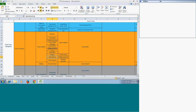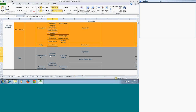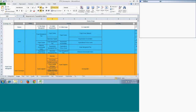Prototyping is a very good tool for collecting requirements. Benchmarking is an industry-standard approach — you benchmark your requirements so that they meet industry standards. A context diagram, similar to a use case diagram, helps you identify different activities that need to happen. Finally, document analysis allows you to analyze multiple requirement documents to find the actual requirements. The outputs of this process are the requirements documentation — containing everything captured by these tools and techniques — and the requirements traceability matrix, which contains the requirement ID, descriptions, WBS ID, and other details.